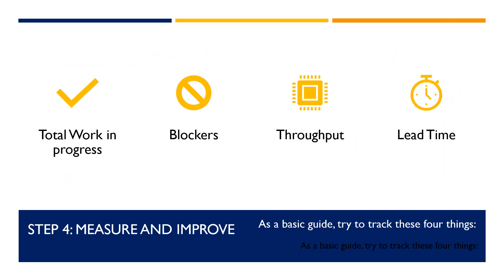Kanban is a system of continuous improvement and evolution towards greater efficiency and output. However, the only way to achieve this continuous improvement is to constantly measure how it is going and adjust accordingly. As a basic guide, try to track these four things: total work in progress, blockers, throughput, and lead time.